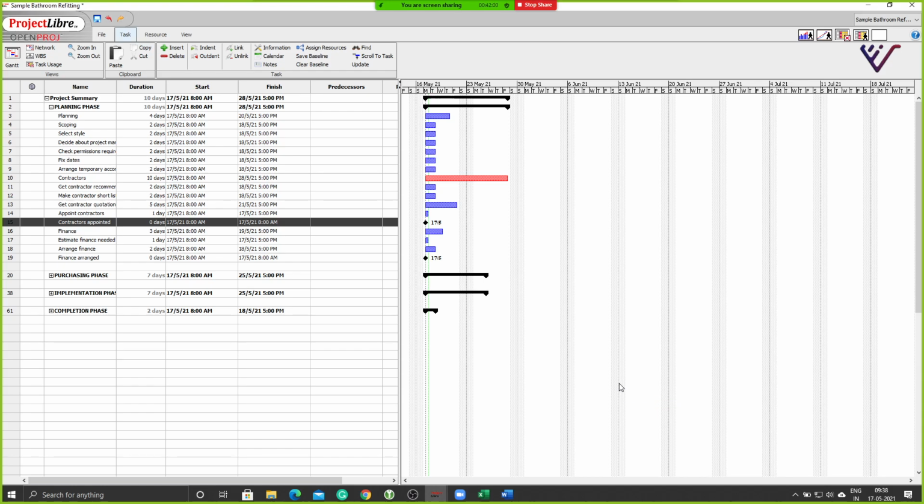Yeah. So why are we keeping it in the activity list? Because this needs to be completed. This activity needs to be completed to consider some of the previous activities here as done, and it is also acting as a predecessor, a mandatory predecessor, for other activities to happen.